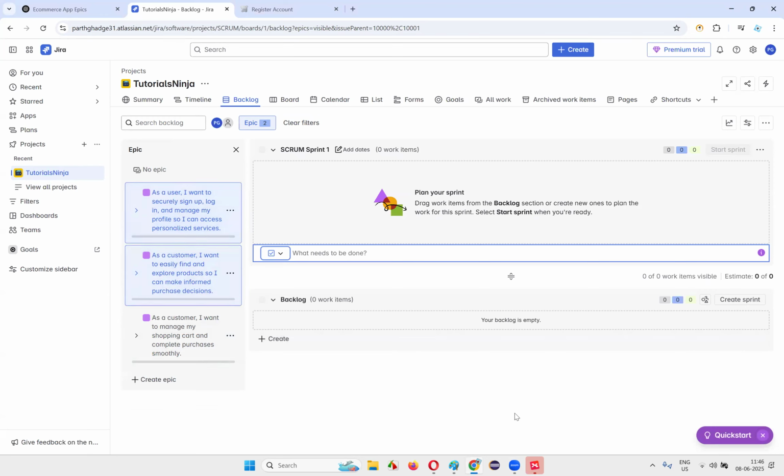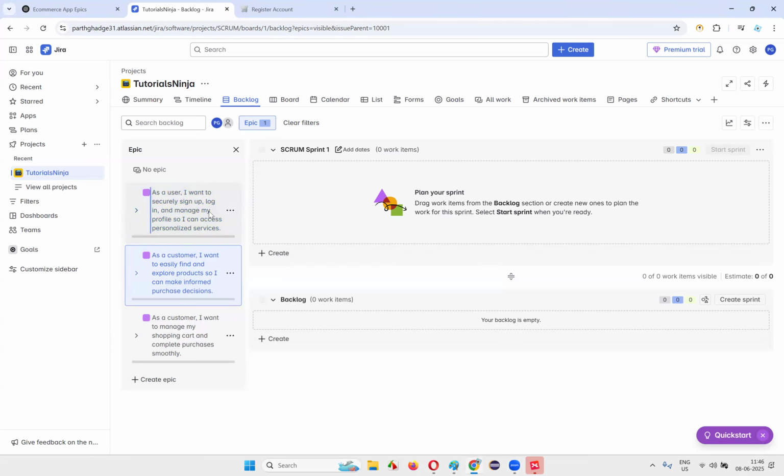Okay. What are epics? Large requirements, higher level requirements, which can be further broken down into small requirements, are nothing but the epics. Here the product owner can create any number of epics, but for sample, this is a demo, right? I'm just giving a demo of the Jira tool. So only a few epics I created. Fine. For each and every epic, I want to create some stories. I want to break these epics into smaller stories.